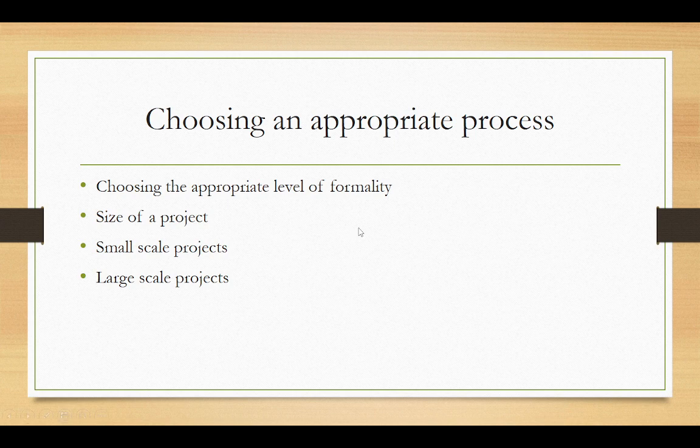If we talk about the size of a project, the size of a project influences the choice of the development process as well. The amount of formality in the process can be minimal. Small teams of up to 10 people can communicate and respond to changes informally. But in larger projects, a well-defined procedure for controlled development is necessary. An informal communication network on its own is not enough in this situation. Just as modularization is the way to deal with the complexity of a software system, developers can be assigned different activities and deliverables within a given project. This partitioning allows developers to specialize and become analysts, designers, programmers, and so on.